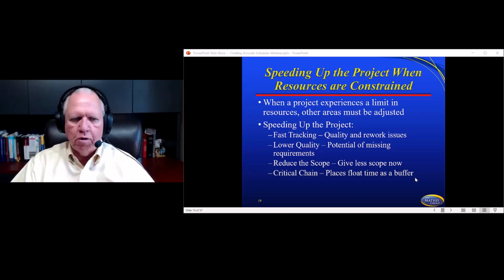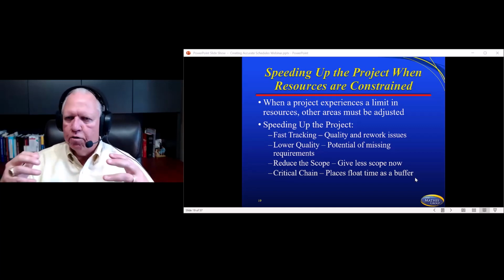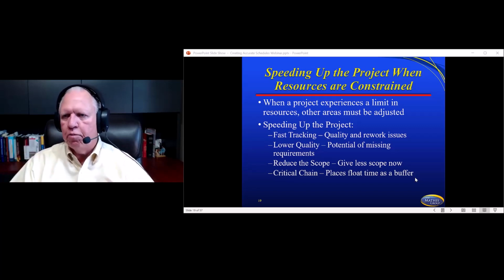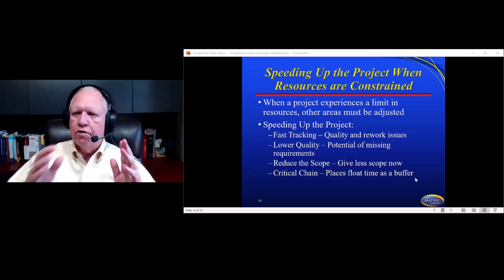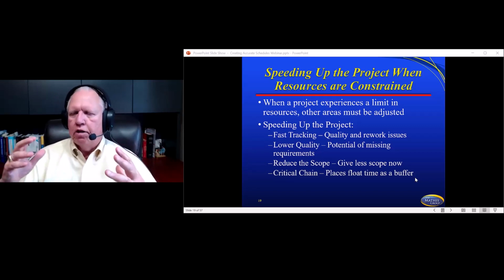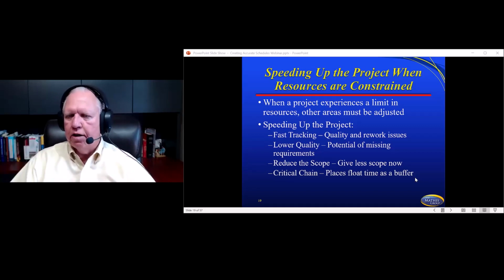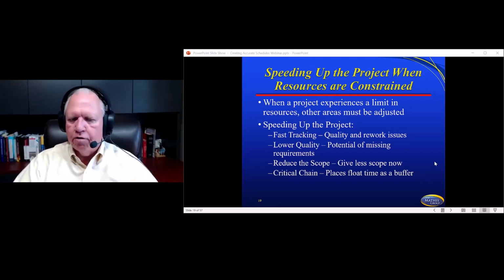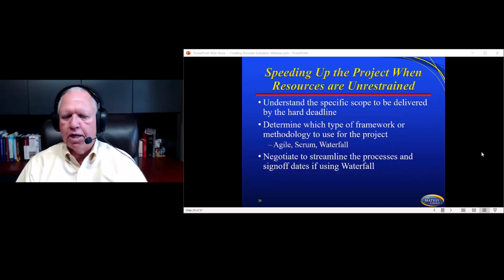Critical chain was in the airline industry for years, and it is a technique that some people are using rather than scheduling all the activities with some type of contingency that could embellish the scope or the duration of that actual activity. They put it in one big pot that they can drop off and hold that schedule a little bit tighter. And so I can see some advantages of some of that as well.